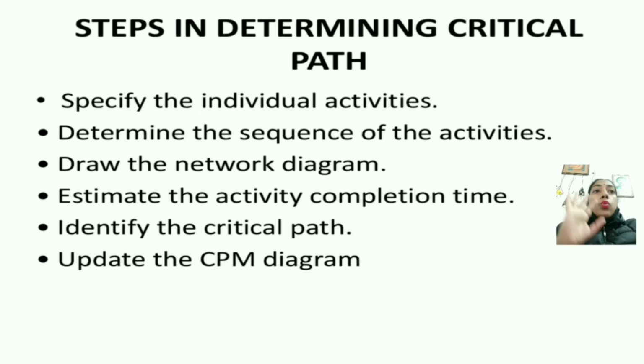Once the activity sequence is correctly identified, the network diagram can be drawn. Although the early diagrams were drawn on paper, there are a number of computer software packages now, such as Primavera, that are helpful in creating the network diagrams. Then estimate the activity completion time. This should be the direct input from the estimation sheet. Most companies use the 3-point estimation method or COCOMO based methods for task estimation. So we can use the estimated information for the steps.